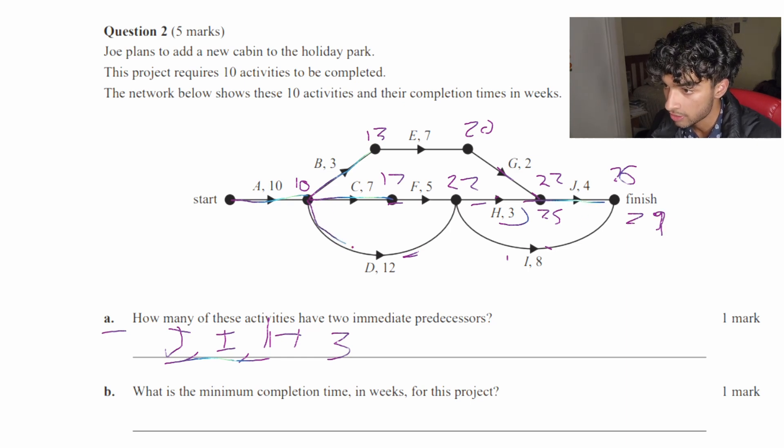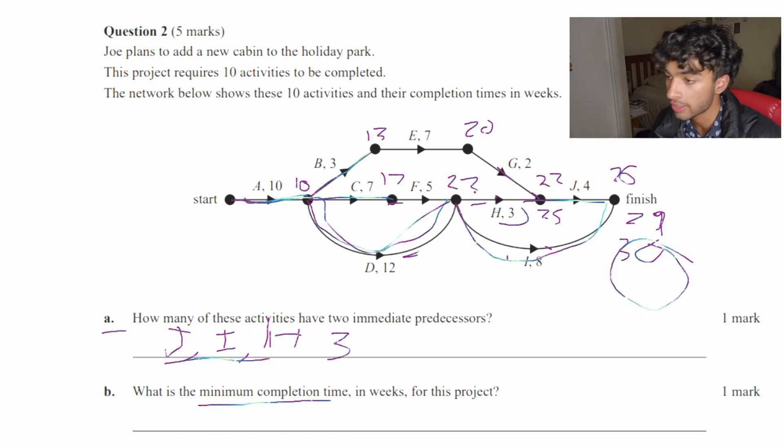And then this is actually the same path. So we can just skip straight to 22. And then if we go down here, it actually goes to 30. And that is all the available paths that we have. And since this is the longest, I know it says minimum completion time, but the thing is, you have to complete all the activities.